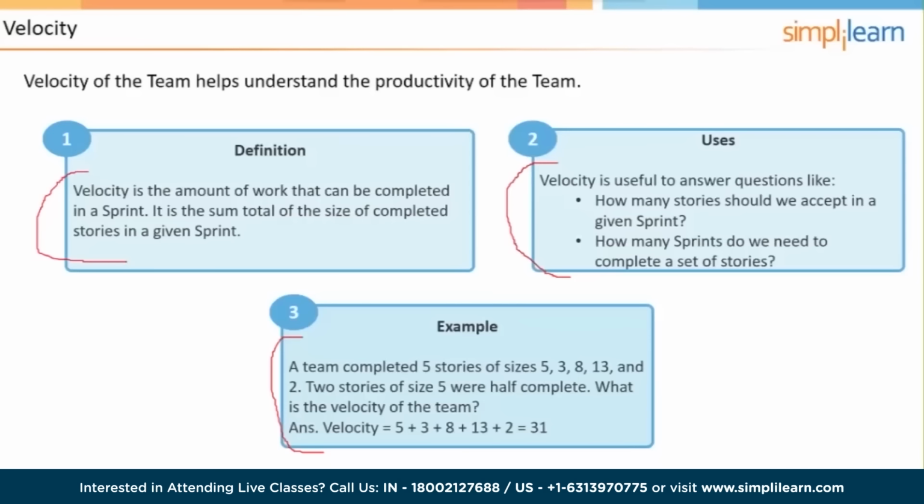So even if the team had finished 9 out of 10 story points for a user story, meaning it's almost done, and then the sprint ends, that doesn't get counted towards velocity. And you don't mess around with velocity. You can mess around with your estimating, and you can mess around with what user stories are going to be completed in a sprint, but you don't. The velocity is not variable. It is what it is based on past performance.